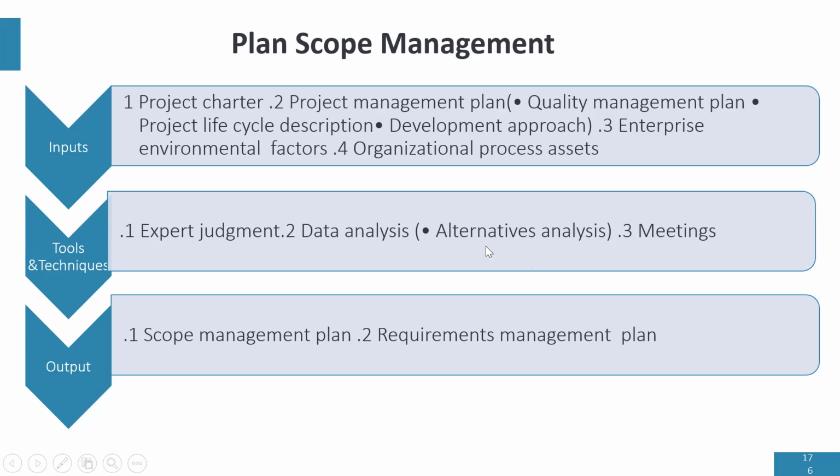So we look at alternatives, and then please, I beg you, the fact that you have access to templates does not mean that you are going to start creating the scope management plan on your own. You must have meetings with stakeholders, which means you are expected to develop the scope management plan and requirements management plan with stakeholders, the sponsor and applicable stakeholders, right?